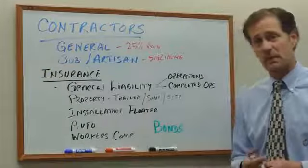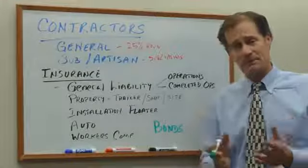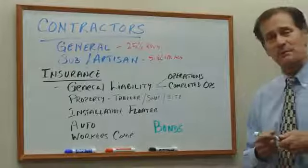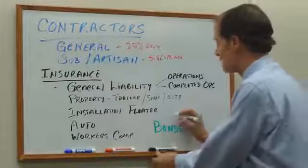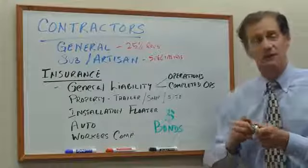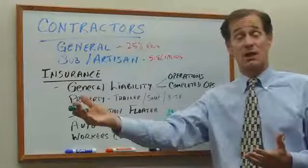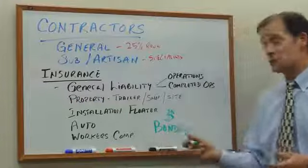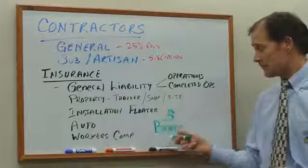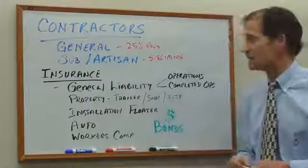The last thing I'll mention is bonds. In a contracting environment, a performance bond is the most common type. A performance bond really isn't a type of insurance — it's an extensive credit check that says you are financially capable of completing a job that you're bidding on. A bid bond actually comes before that and says this person is qualified to meet the requirements of the job.